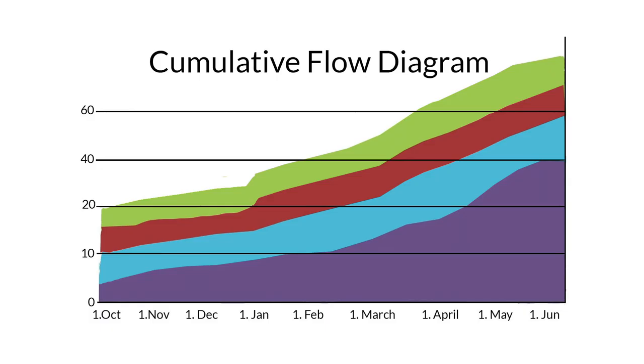Here, the areas are rapidly widening. Can you guess what this means? If you said more tasks are coming in than leaving, you're right. It's the most widespread scenario you'll see on a CFD, typically resulting from multitasking or focus on non-value-adding work. This means you should focus on finishing tasks before starting new ones.